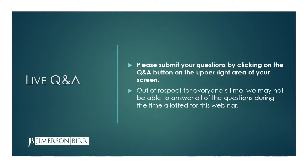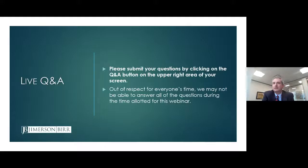Yeah, I'm not sure I totally made that clear in my presentation, but yes, if you have a direct contract with the prime contractor, there's no notice that you have to provide before bringing the lawsuit on the bond. Your only obligation is to timely bring the lawsuit within the 90 days, or I'm sorry, the year of the last date of your final furnishing. That's the only obligation. It's only those subcontractors and suppliers who don't have a contract with the contractor who have to serve the notice to contractor and the notice of non-payment under 255.05.